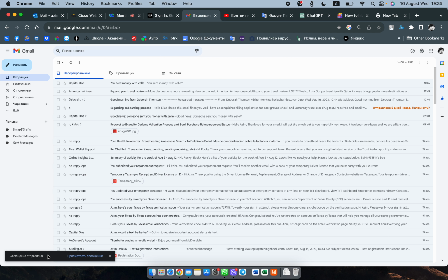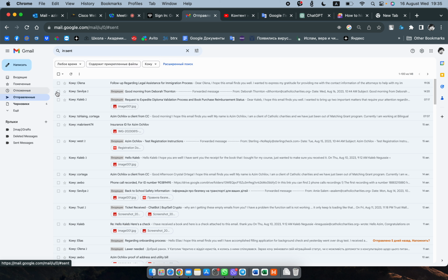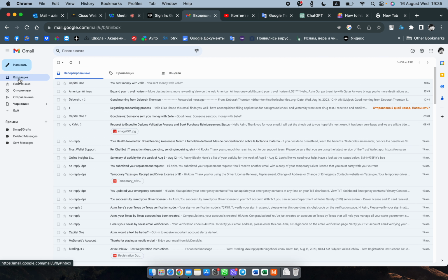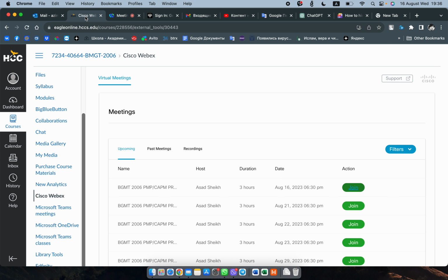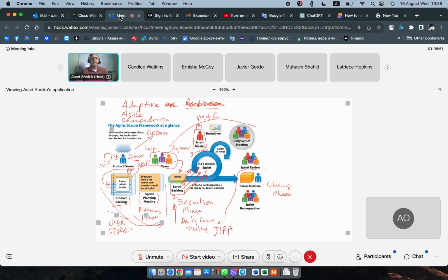Now, sometimes what happens is, as a practical thing, let's say you are working on a 3-month project, not a 2 to 4 week, but a 3 or 4 month project, and you are falling behind. Let's say you had your schedule and you start to find that you're falling behind, and you were having your weekly meeting, one meeting a week, and that was fine, because if you were on track, then one meeting a week is perfectly fine. But you're discovering that you're falling behind. So what will be the first thing you're going to do? You're going to increase the number of meetings for just that reason.